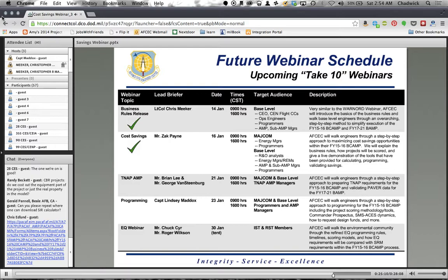In ACES, under the Other Costs tab, there are some new drop-downs loaded, and one of them is there for basically a savings to investment ratio. So you pick that drop-down, you put in the SIR, the decimal that the calculator spits out, and that will be your SIR for that requirement. You also want to put a comment there. In the comment, we recommend that you put either BLCC or project savings calculator for the method of determining that SIR.